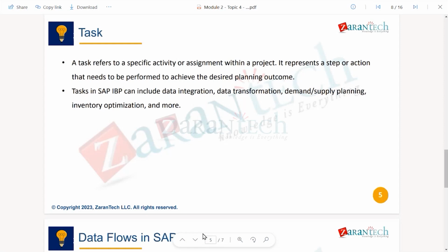This project charter is nothing but the list of activities which are required to be executed for the completion of the project, and each and every activity is divided into smaller sub-activities. These smaller sub-activities are called tasks. A task is a very small kind of target which is given to a specific team member. For example, if a project management team has, let's say, 20 people working on a project, these 20 people will have their individual tasks, goals for a very short term, which they have to complete in this time.